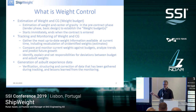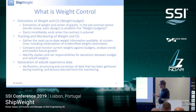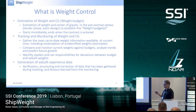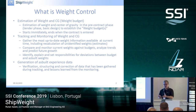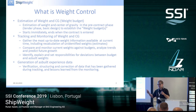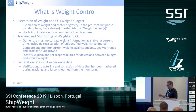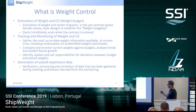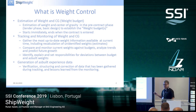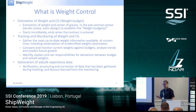The final phase, which we think is very important but very often neglected — a sin of omission — is the generation of as-built experience data after the ship is launched. When you launch your vessel, and hopefully everything is fine, make sure you complete your weight model. If it lacks 5% or however much, fill in the rest, do the afterwork, do verification, structure and correction of data, and gather the lessons learned. Because your experience data is your most valuable data for estimating new projects.